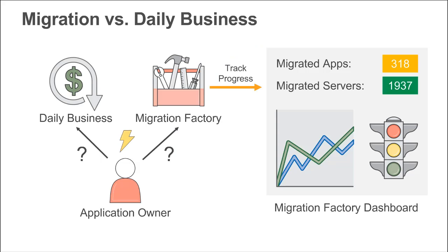Moving on to the next slide. What we really want to emphasize is, while you are performing this migration, regardless of the path that a particular application is going to follow, or the migration strategy that you will follow for a given workload, what is imperative, what is of utmost significance, is remember there will be additional constraints on your resources. Resources being your application owners as well as your IT resources. Your application owners will now have to perform a double duty: while supporting your migration initiative, they're also keeping the lights on and running business as usual. And that would be an additional constraint on your human resources.